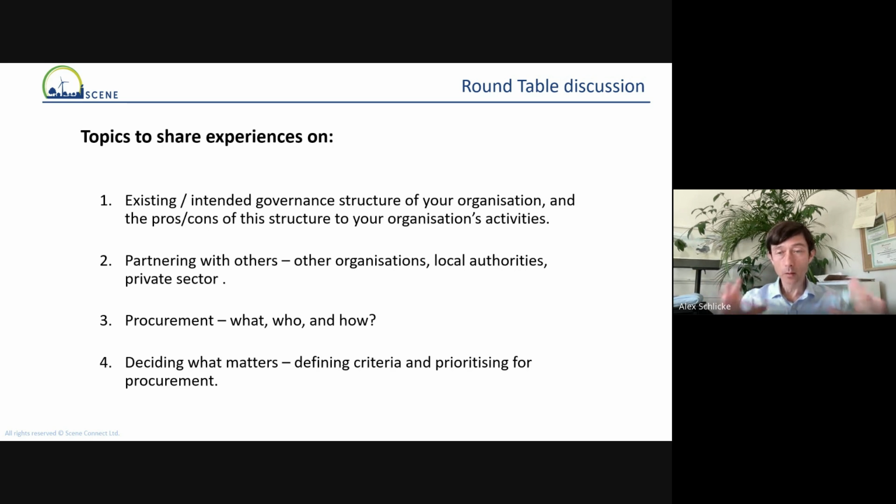So there are things that you can do during the procurement process. That's why identifying the right contractor to work with, who can value engineer, matters, as does what approach they're going to take to any cost increases or even cost savings, and how they're going to be apportioned. Those are things you can get into the real detail of as you work through, but always with the right project team, you can find a solution.